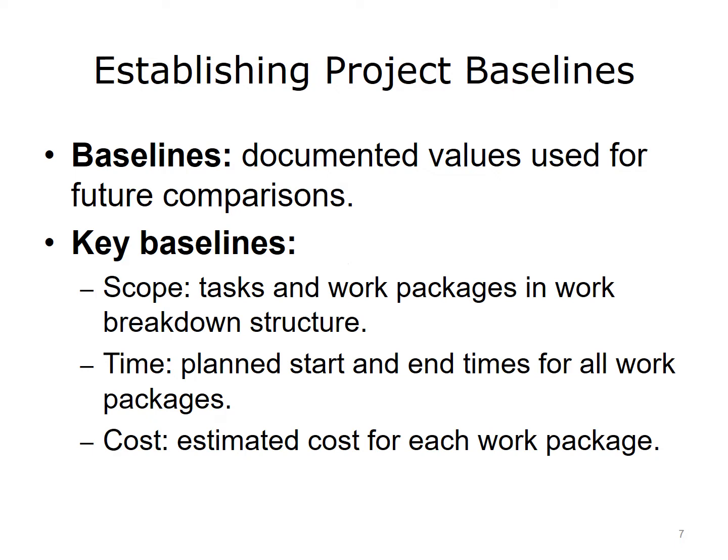The cost baseline will consist of the estimated expenditures for your entire project, as well as for each work package. Depending on the complexity of the project, you may need to break down expenditures for each activity within the work package. Setting these baselines will establish a fixed point for comparison and monitoring purposes should your project get altered, and it will.